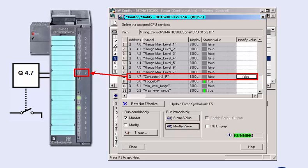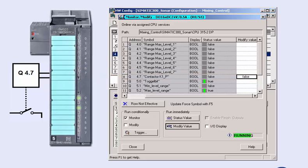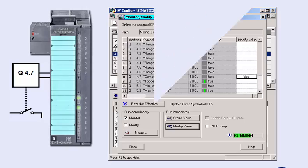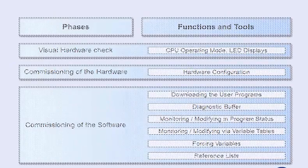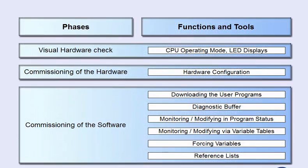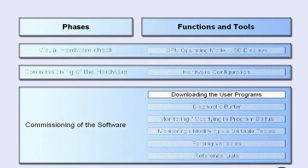After terminating signal testing, you have a verified hardware with tested I/O signals. The requirements for commissioning the user program are now fulfilled. The next step is software commissioning, which starts with loading the user program into the controller.